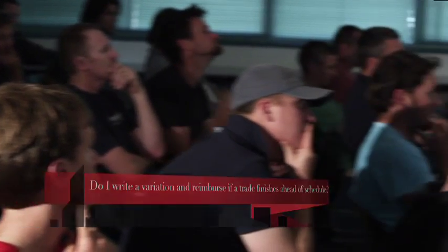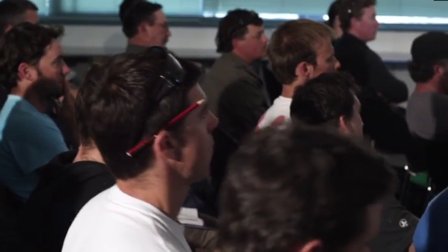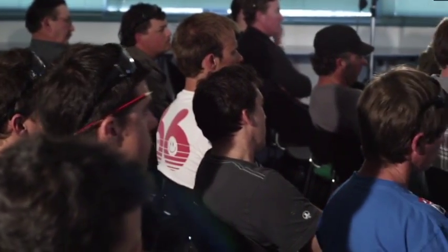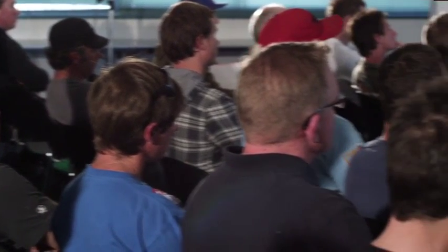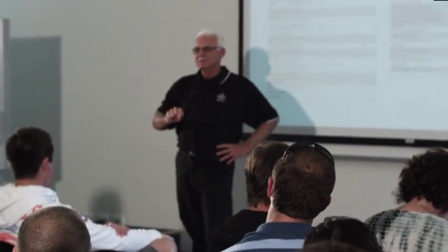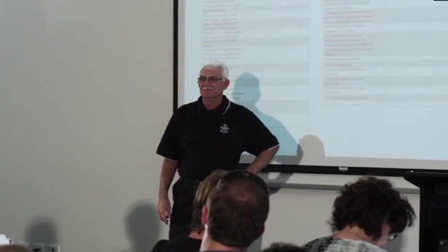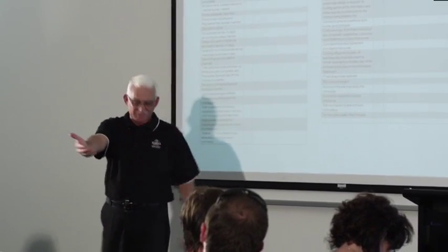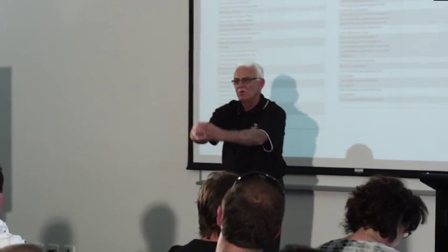When you put a price together, and I recommend this for a quote as well, whether it be a small one or a large one or a contract, don't break it up. Don't give them any figures at all. Because if you start quoting figures, they're going to come back and start disputing you. You might say that the tiler is going to be there for 4 hours at $100 an hour. What's going to happen if the tiler is only there for 3 hours? The owner's going to turn around and say, I want $100 back. You said he was going to be there for 4 hours. You've charged me for 4 hours, but he's not. Combine it all in one.